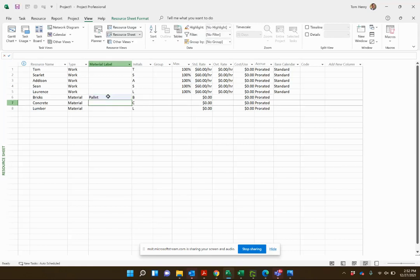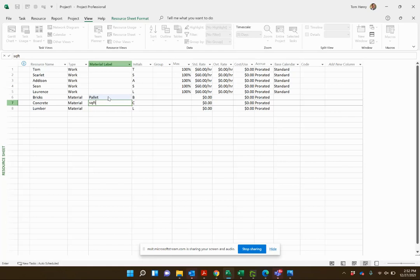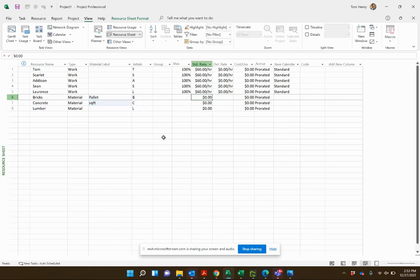How much concrete? I'll do that by the square foot. You'll model this on how you get charged. I get charged by the pallet of bricks, it's two hundred dollars a pallet. I get charged fifty dollars per square foot of concrete, so however you're being charged, model it that way. Makes it easy.